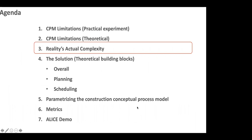Now we're going to move into reality's actual complexity. We've looked at the practical limitations of doing it by hand and the theoretical CPM limitations — the tool forces you to use precedence constraints to resolve resource constraints. Now let's take a look at what else you need to model.